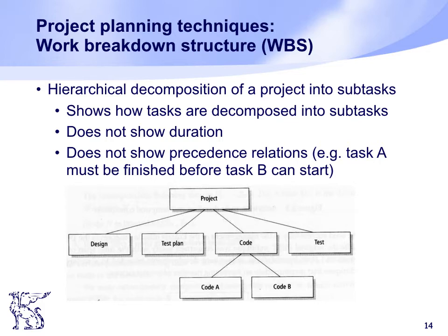The top level represents the completed project or completed product, and the second level depends on those larger portions, by combining which you get the completed product. And if you go deep down to each level, you can break it into smaller subparts or subtasks.